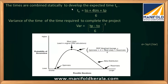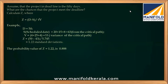Once we know the length of the critical path, that is the expected project duration. If we want to know the probability of completing the project within a certain number of days — say 50 days — we use the Z-score formula. Z = (D − S) / √variance, where D is the deadline of interest and S is the length of the critical path calculated from CPM analysis.